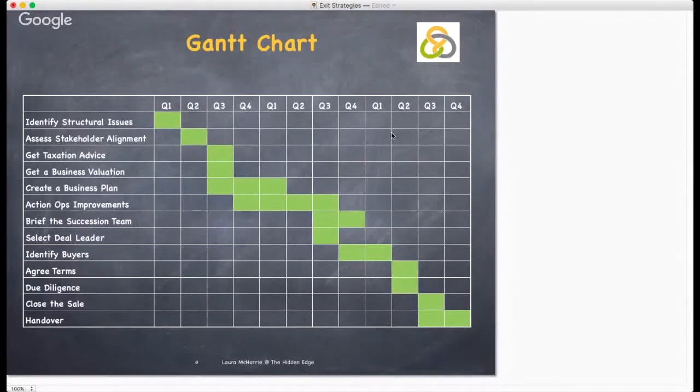Henry Gantt created charts to provide a graphical depiction of time rather than quantity, thereby enabling a manager to monitor the progress of a project and take appropriate action should it fall behind schedule. He claimed at the time, the principles upon which the charting method are founded are easily comprehended. First, the fact that all activities can be measured by the amount of time needed to perform them. And second, the space representing the time unit on the chart can be made to represent the amount of activity which should have taken place in that time period.